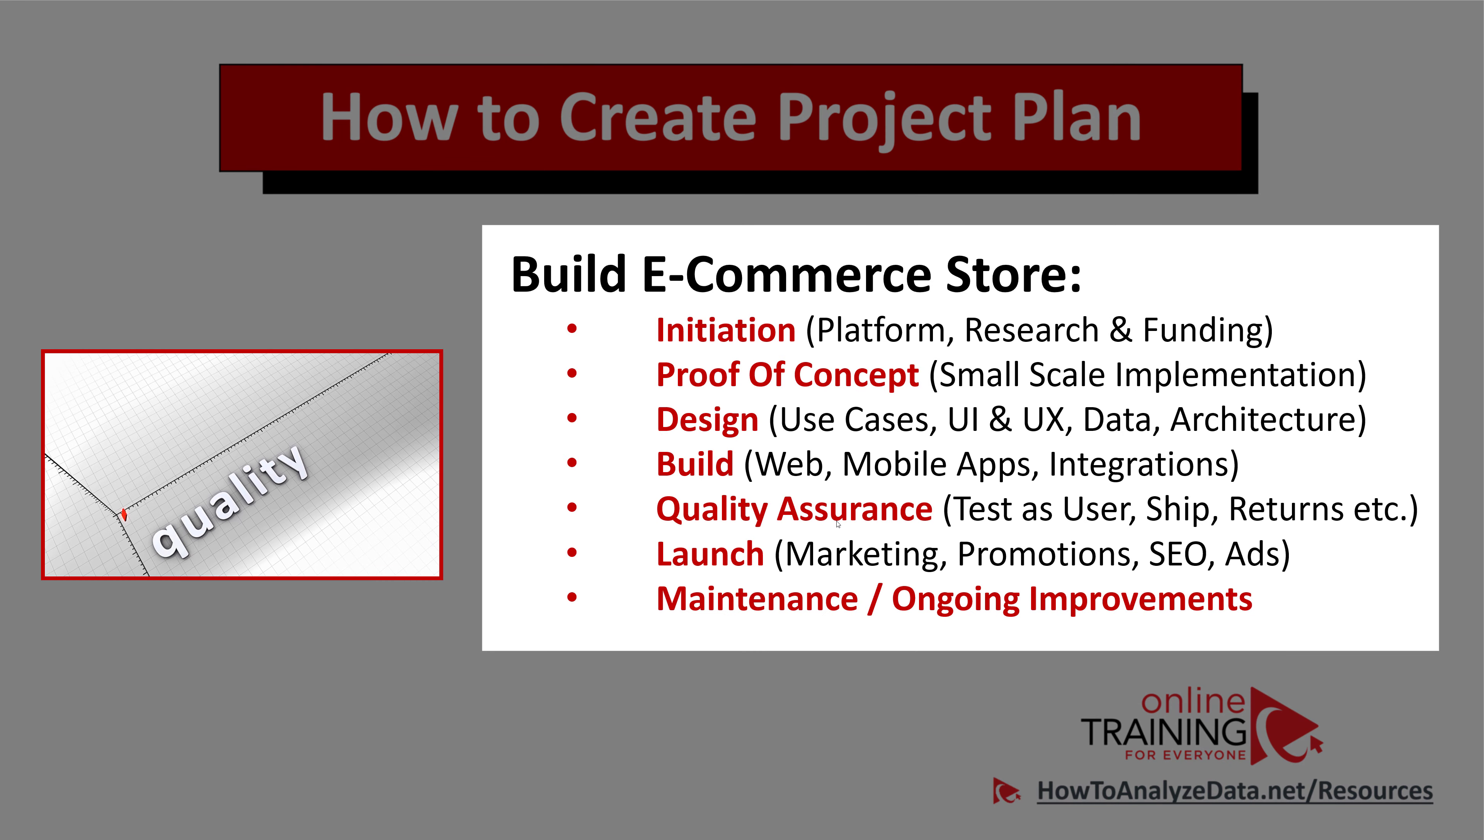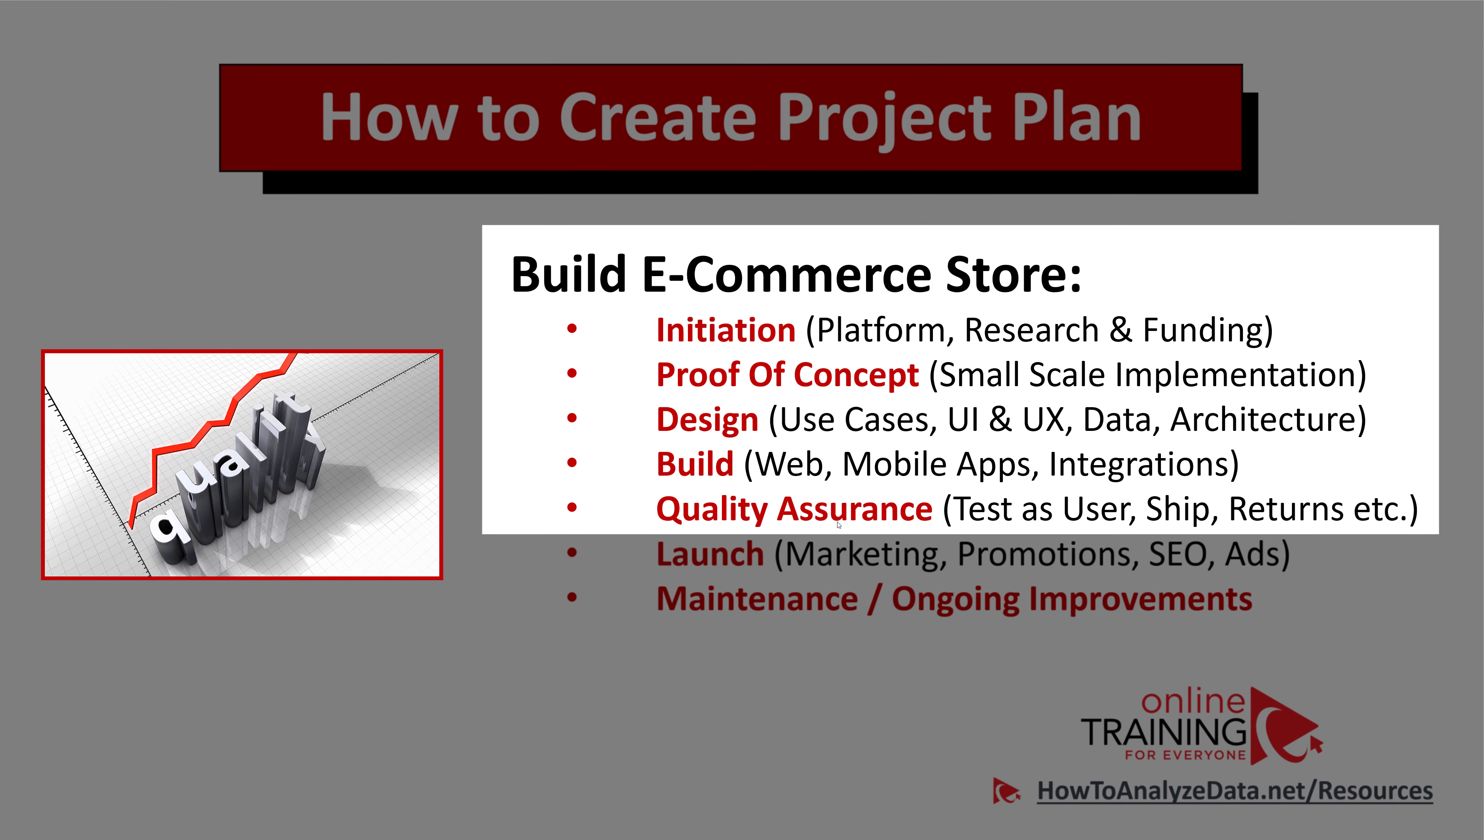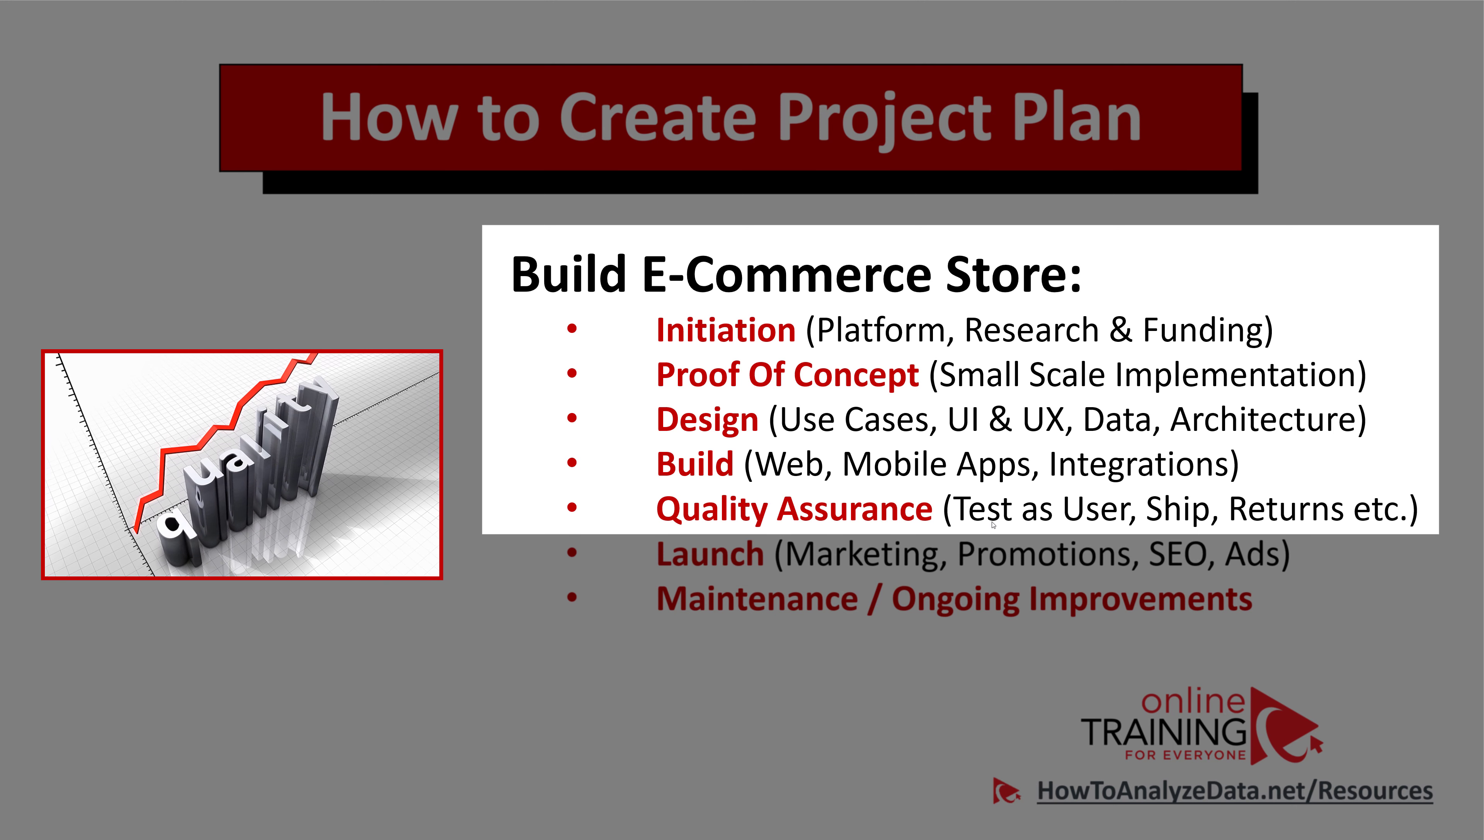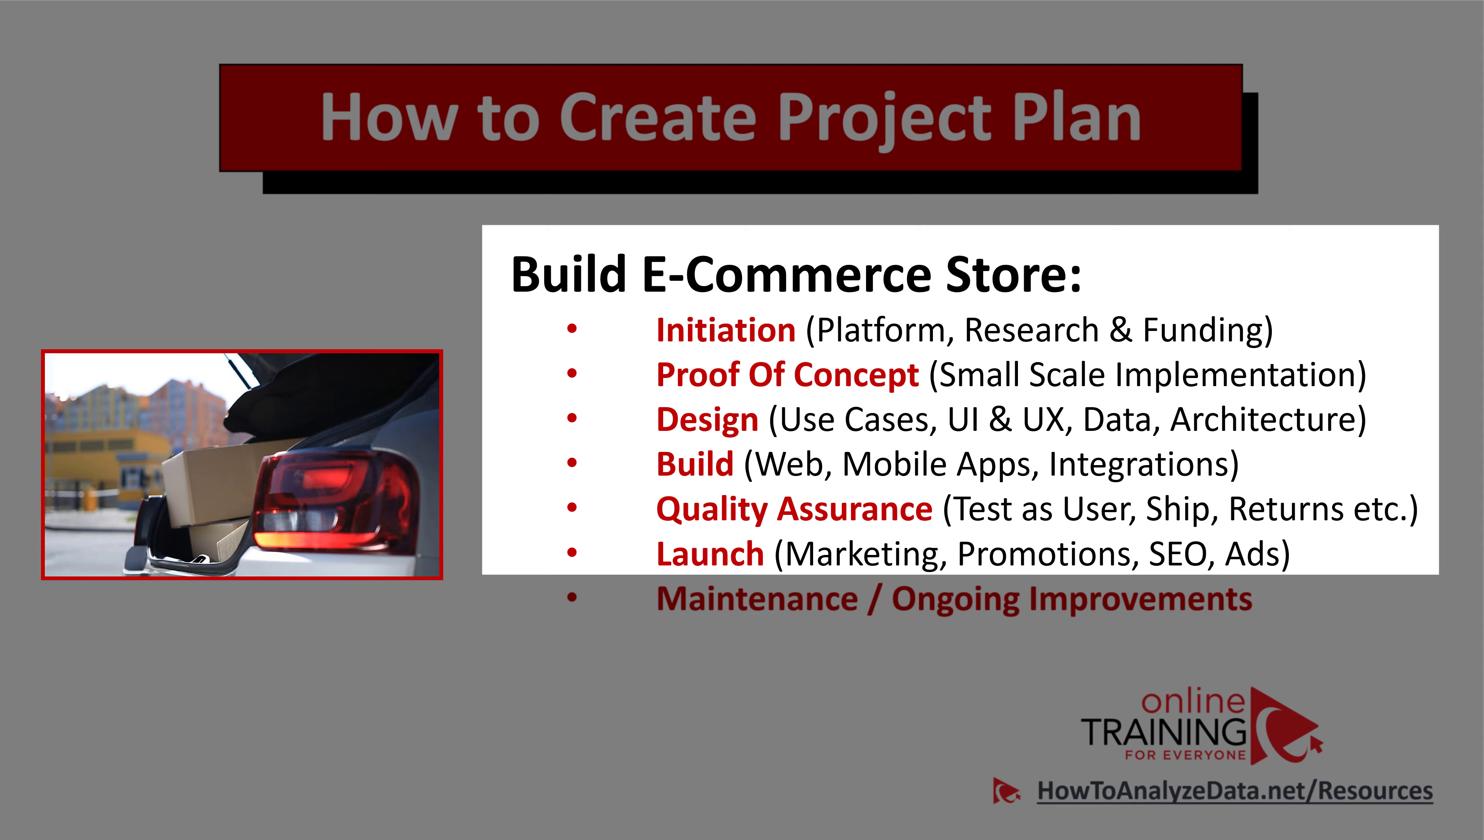Quality assurance for an e-commerce store basically means that you need to test your store as a user. You need to come in, find what you're looking for, order this product, receive an email, and on the back end, you need to make sure that shipping works and you have a process for returns.